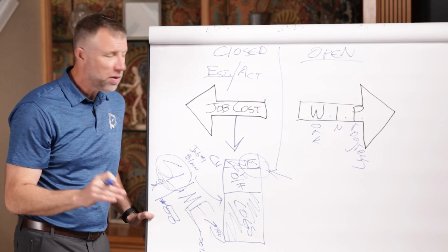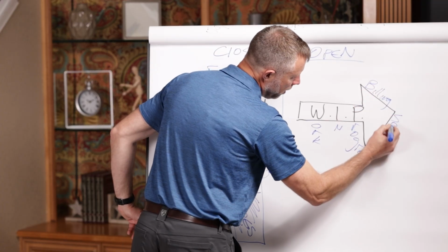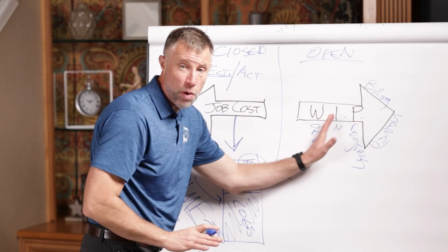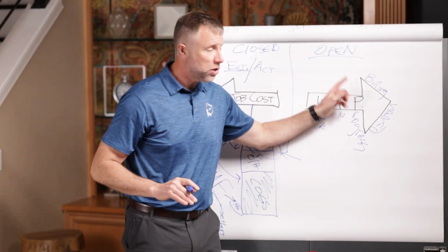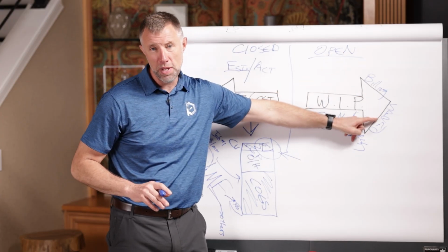And so work in progress is tracking to see, is your billing keeping up with your spending at the same time? So this is really kind of a cash flow issue we're looking at. So if you hear the term WIP billing, we're looking forward to open jobs, and we're trying to see if our billing is keeping up with our spending. And so let me go back.